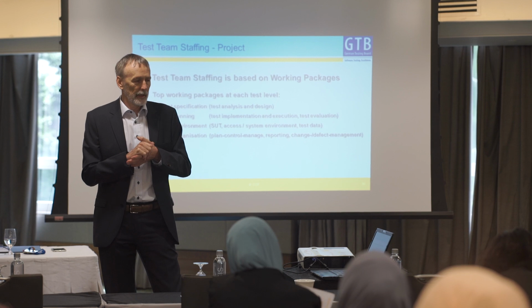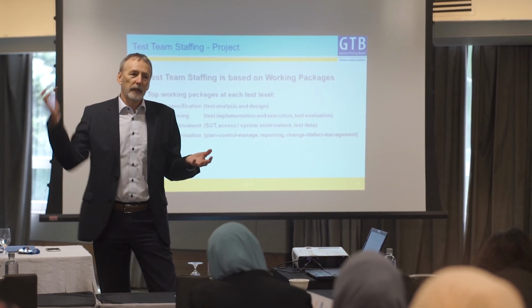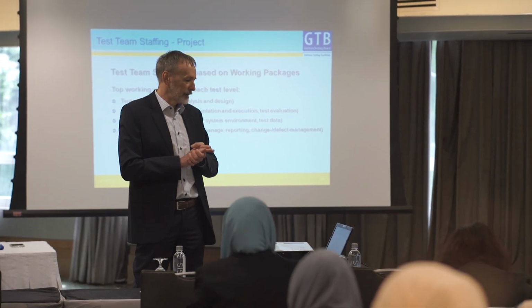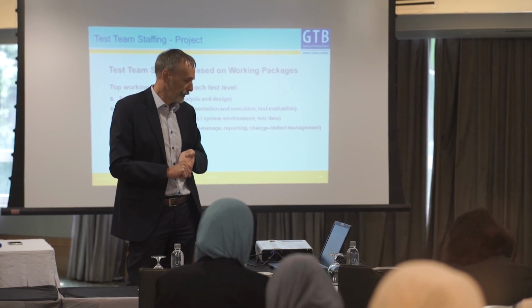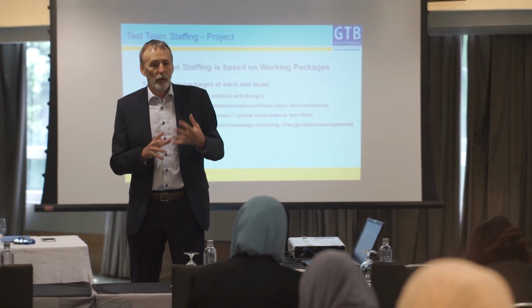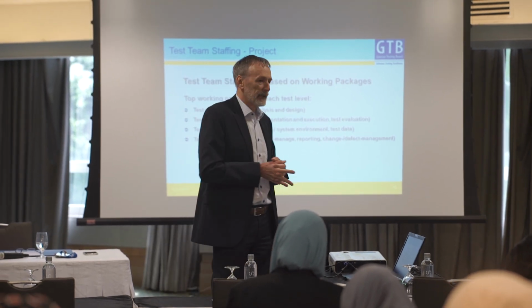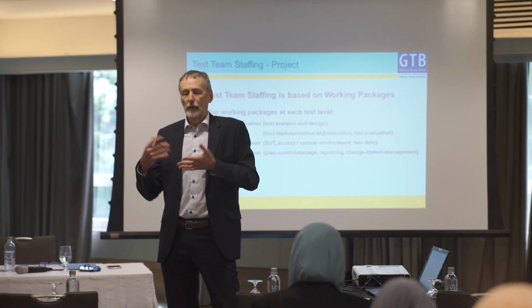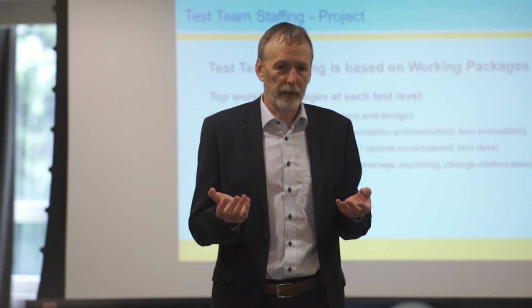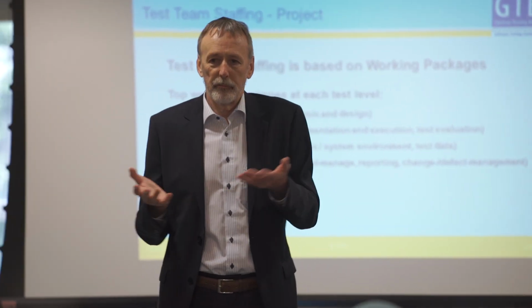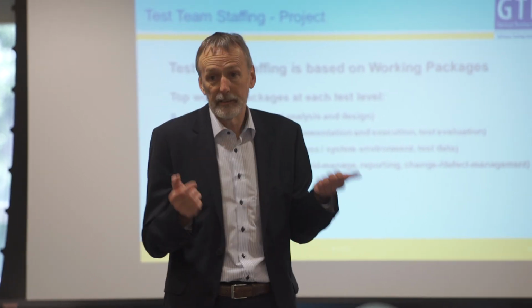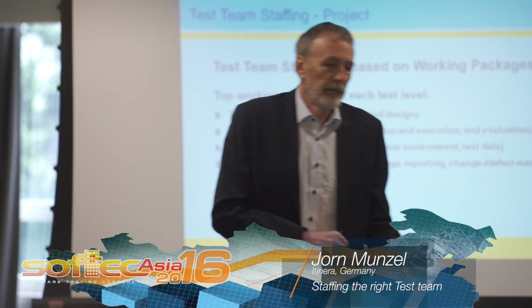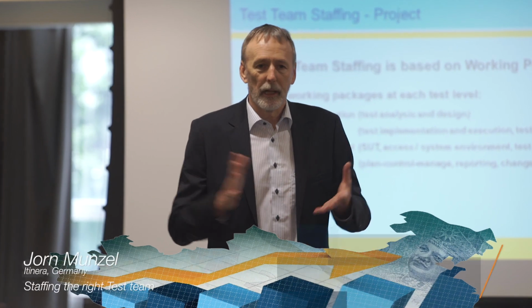I have to execute test cases, find bugs, get fixes, do retests, and put all the test results in reporting. And then for executing, I need a test environment. In larger projects it is more often its own work package, because you have to get hardware or access to the hardware, and you have to get test data and all the things. And nevertheless, you need a test organization. You need a kind of test management.